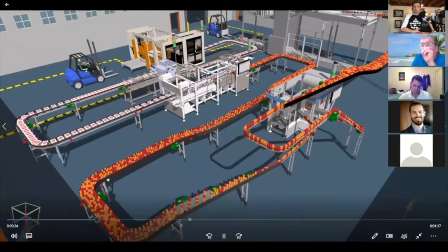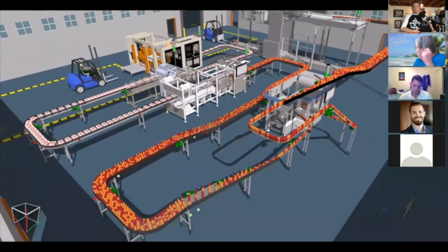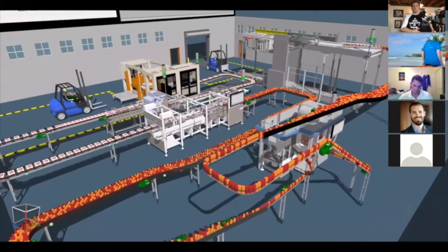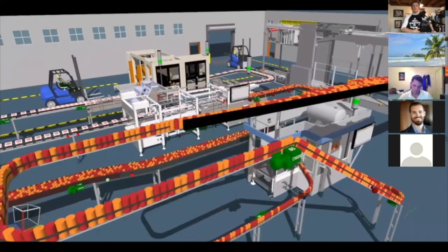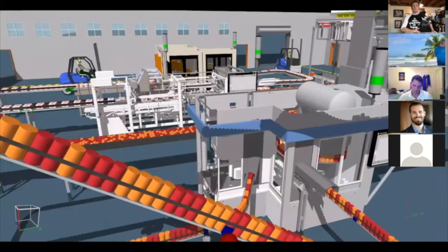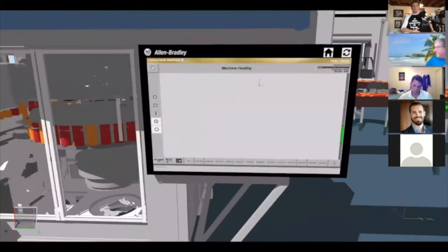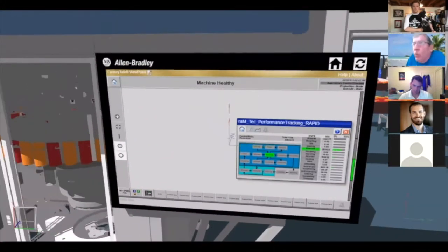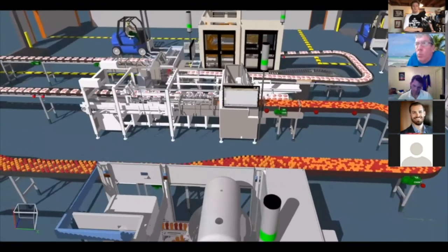I think they are. Yeah, so that's a really good question. Obviously the experience customers have can be highly variable, but we get customers who report all the time, we have reduced our field commissioning time from 3 weeks to 3 days, or from a month to a week. How you calculate how much they are getting done virtually instead of in real time can be a little bit tricky, right? Is that 75% if you're going from 4 weeks to 1 week? Well, maybe, but sometimes the last 20% of the work takes 80% of the time.